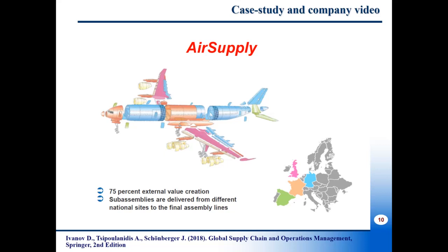Delivery dates are coordinated with suppliers at weekly intervals on both the capacity planning and order levels. The production of components begins before the date on which the customer is able to request the last modifications. Final assembly itself takes around 1 month. This intensive process of coordination with suppliers is managed by Air Supply.